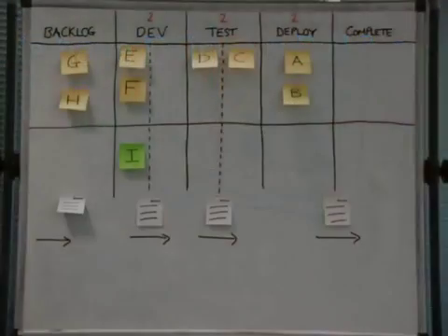And effectively, he's now multitasking across multiple projects, which is quite inefficient anyway. There's a number that says that multitasking typically costs 20% of the day. Does that answer? That's probably not the best answer, but it's really a capacity planning issue and making the policies explicit.